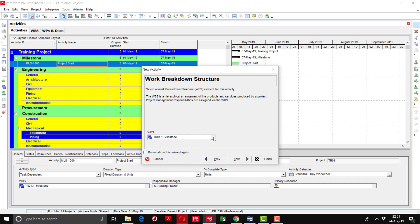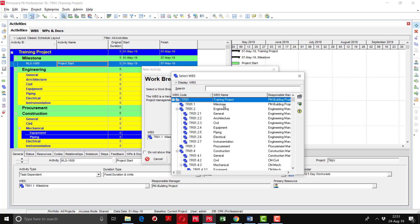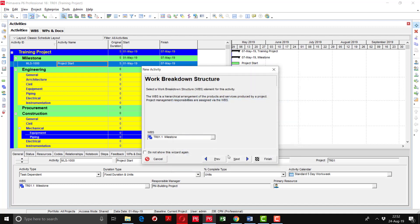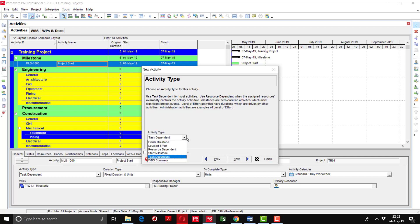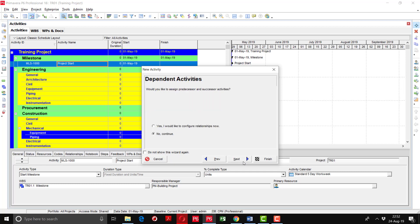The wizard asks for the WBS, which is already selected, but you can change it here if needed. Click Next and select the activity type — since Project Start is a start milestone, select 'Start Milestone' as the activity type, then click Next. The next step asks about dependent activities — whether to assign predecessors and successors — but we don't want to link activities yet, so select No and click Next. The following screen asks for project expenses, activity codes, and documents, which we'll skip.